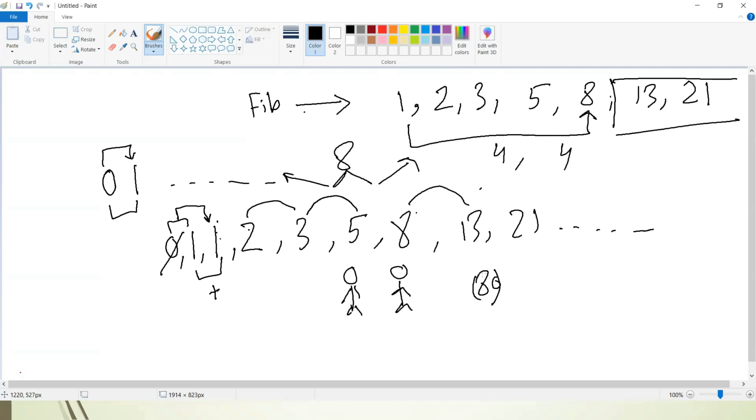Once we assign another person, the load is divided into 4 and 4. The work is the same in the company: when user stories reach 8, they need to divide the task into 2 more user stories.